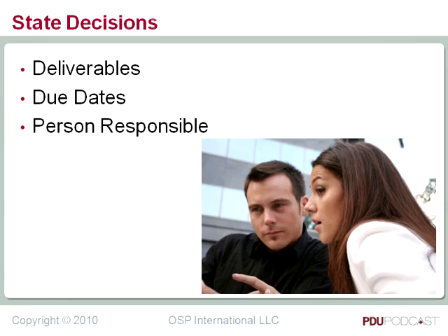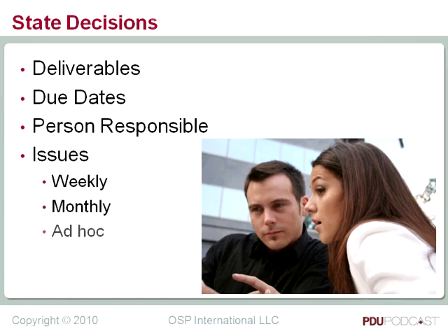And then as far as the issues are concerned, whether it's a weekly meeting, a monthly meeting, an ad hoc meeting, it doesn't matter. Certain decisions have been made, and you want to make sure that everybody is clear on the decision. And not only that, once again, who's responsible for that and when is it due?